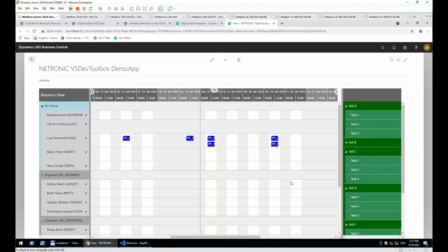Same as for resources and for activities, we have no limit, I would say. You have one element, and when you define the parent ID, then this element gets a child from this parent. This could be done for job C, for example, as well. When you set the parent ID of job C so that the parent is job A, then this would become a child of job A. And by this, you can get multiple levels. So there are not just 2 levels, but more or less indefinite.